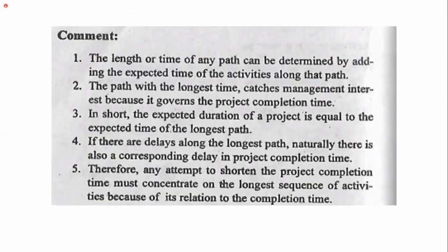So comments or notes. So dapat i-take note nato. The length or time of any path can be determined by adding the expected time of the activities along that path. So i-add ra na nato tanang time, number of days or number of weeks for the activities. So makabuhat na ta og total path. The path with the longest time catches management interest because it governs the project completion time. So mao na siya gitawag og critical path.